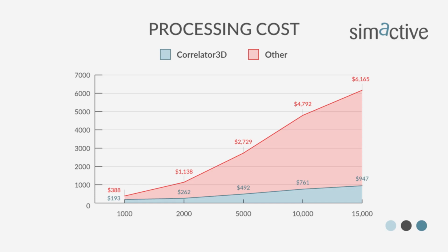So if we look at correlated 3D and we say we're just going to process this in one data set, if we look at, again, just the amount of time people are touching it, I'm not saying, if it's 100 hours to process in the software, you could bill that 100 hours at X dollars. You can't. So we're only looking at the amount of time that people touch it. And again, every time you create a subset, somebody's got to go back in and touch it. They've got to edit it. They've got to QC it. They've got to approve it to go back into the pipe and all that. So this graph is showing you potentially really your losses as you break those projects up into smaller subsets.